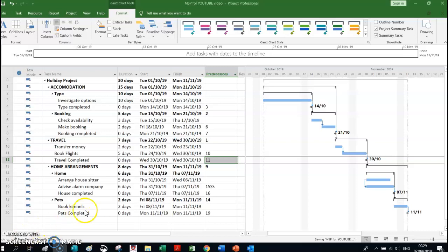I think where we left off I was about to put the page numbering on automatically. We don't put our numbering on ourselves. If we put our own numbering on, and then changed tasks, added tasks, or deleted tasks, all our numbering would be incorrect. We therefore allow Microsoft Project to number all our deliverables and our activities.